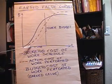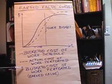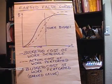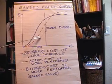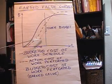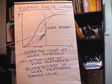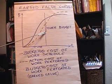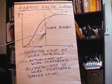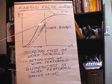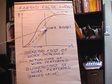The third one is this red dotted line — this is actually the Earned Value curve itself. It's the Budgeted Cost of Work Performed. This is how much value we're getting out of our project — whatever is completed — according to the budget. So sitting right here, that's how much value we get according to our budget: the earned value, the value of everything that's complete according to the budget. Notice this is what we've actually spent, and this is the value of what we've actually got. The difference on the cost axis is the amount that we're currently over budget. So if we continue, we're going to be way over budget at the end of this project.